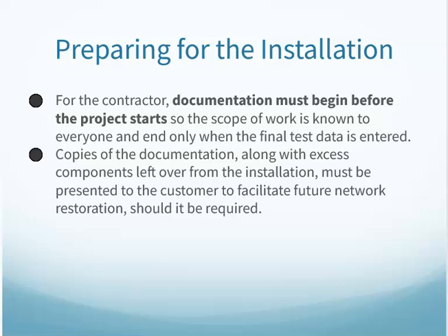Documentation for the contractor really needs to start before the project even starts. In the design phase and picking out equipment and supplies and so forth, documentation needs to be started. Copies of the documentation, when they're done, along with any excess components, ports, etc., should be turned over to the customer. That way they have the documentation and they have extra ports and supplies that they can do the repairs and keep the system running over time.